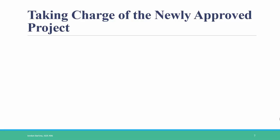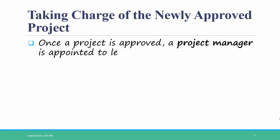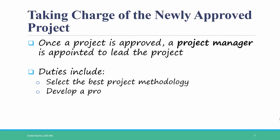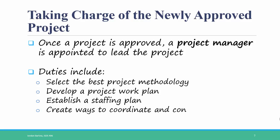Once a project fits into the project portfolio and is approved to begin, a project manager is appointed to lead the project. The project manager could be the systems analyst in some organizations, especially very small ones or in consulting projects, but in large organizations the project manager is often someone different. The project manager could in rare cases be the project sponsor, but that doesn't happen very often. Duties of a project manager include selecting the best project methodology, developing a project work plan, establishing a staffing plan, and creating ways to coordinate and control the project. We'll talk about the first two duties this week, and next week we'll focus more on the last two duties.